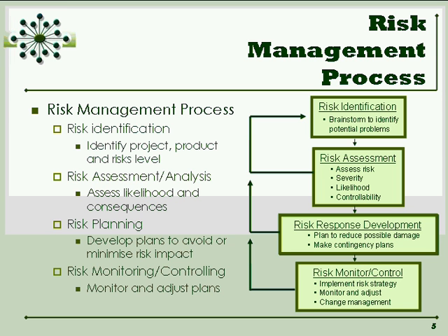The last point here is this is a living and breathing process. This is something you need to evaluate. The two definite time points where you want to look at risk management are before the trial starts. And then after the trial, you want to do a sort of lessons learned, what worked, what didn't work. But they also should be monitored or rethought about several times throughout the research study. It kind of depends. If you have a 5-year research study, maybe doing this quarterly makes sense. If you have a 5-month research study, maybe doing this weekly makes some sense.